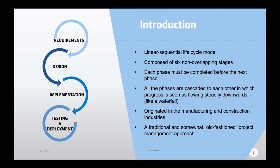This process is similar to how water flows from a mountain — flowing steadily downward — and that is why it is called the waterfall model. Each phase feeds into the next: requirements are the input for design, and design is the input for implementation. Each phase must be documented, reviewed, and signed off — usually via email as proof — before moving on to the next phase.